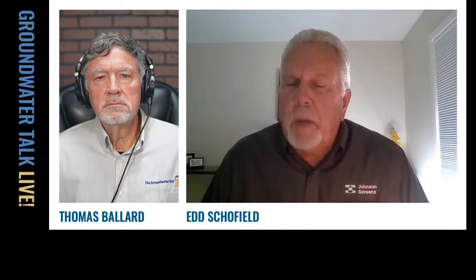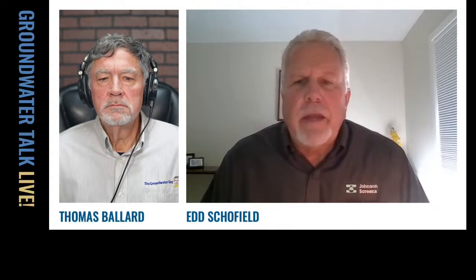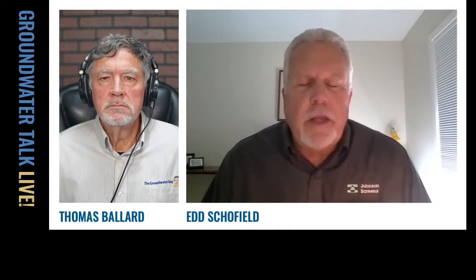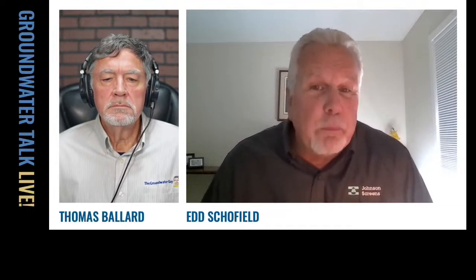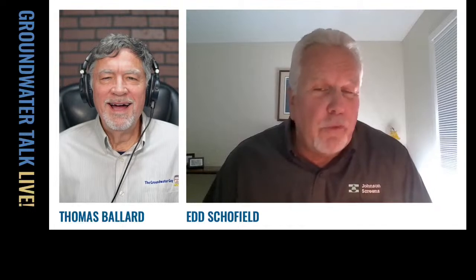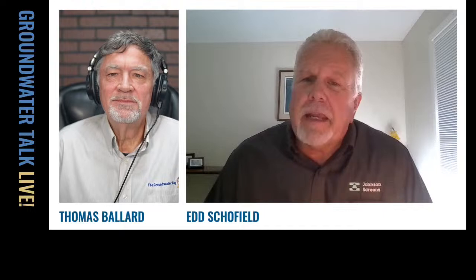And if it doesn't respond, your program should have additional hours for additional well development. A lot of operators will put in a standard 40 hours. My standard joke is, and I think it's funny, but nobody else does, that the well did not read the program. It didn't know that it was supposed to come clean in 40 hours. So you have to take that into consideration.